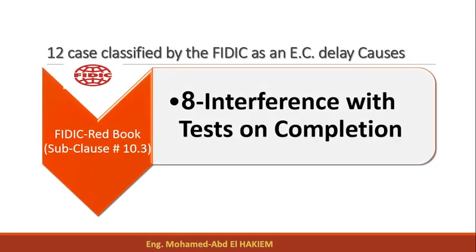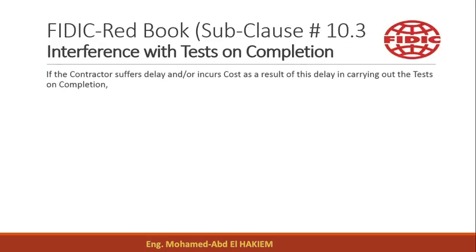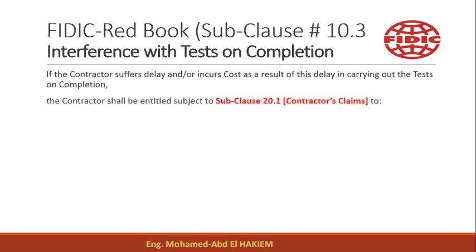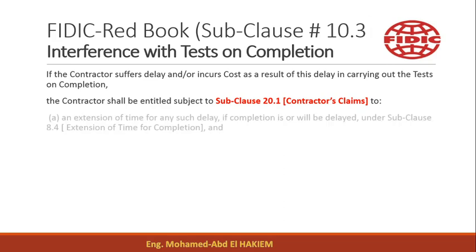Cause 8 – Interference with Tests on Completion. If the contractor suffers delay and/or incurs cost as a result of this delay in carrying out the tests on completion, the contractor shall be entitled subject to subclause 20.1 (Contractors' Claims).